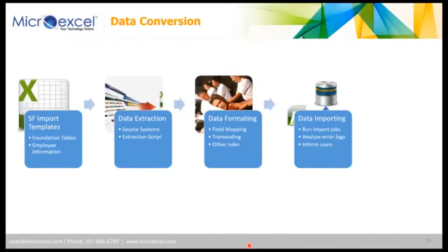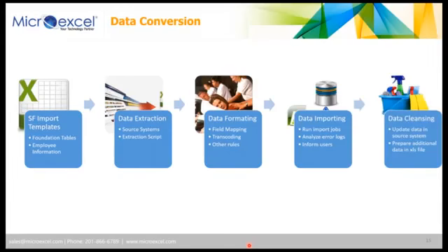Then of course the data importing side, where we will be loading all the data, analyzing error logs, and then we will inform the users, and then that goes into the data cleansing mode, where you need to update the data in the source system. When the data is present in the source system, it's always better to update it there. But sometimes I don't even have the data. Let's say I don't have a good structure for job codes, levels, name it, cost centers, whatever. So I may have to prepare data in an Excel file, which I will then use.